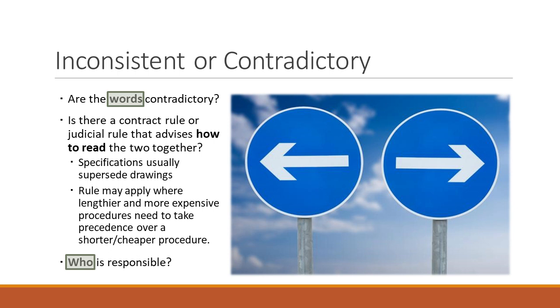Another clarification may be a rule in the contract that says lengthier or more expensive procedure. As you're looking through the specification, there may be a very simple way to do it, and then another paragraph has a very detailed way to do it. That may be more expensive than the simple way, but the rule in the contract may say lengthier or more expensive procedures is priority.